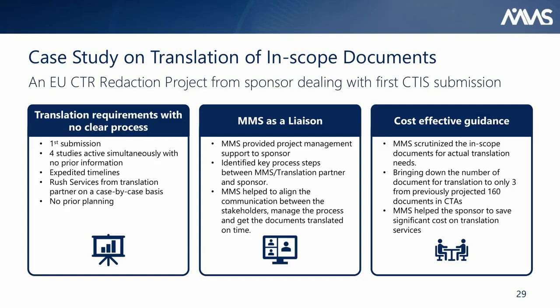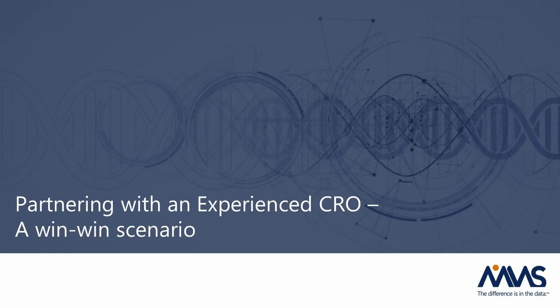Now the question is, even after deploying a cross-functional team, how can we streamline the process of CTIS submission? The Regulatory Affairs team will develop the strategy, project plan, and scope of documents for the CTA based on timelines at hand and for new and transitional trials from CTD to CTR. Medical writers can help the team to avoid redundant use of probable CCI, confidential, and personal information in the submission documents using lean writing principles. Avoiding the use of PPDs like subject IDs in the documents, where we can present the information in a summarized way, should be practiced.